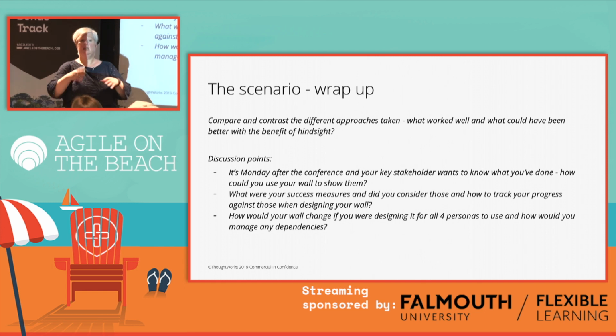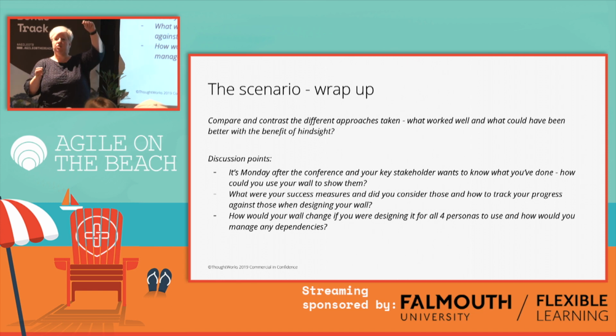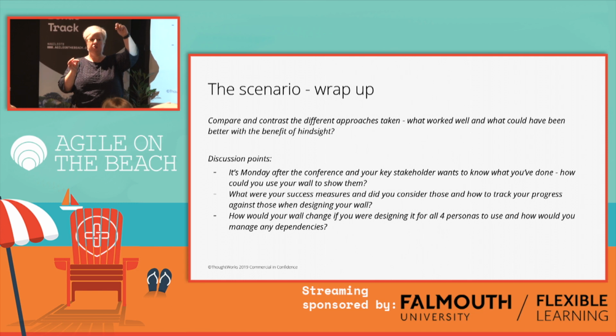I've used that as well. Sorry, the lady here was saying to just take a piece of string and put it between 2 different stories in different swim lanes, just to show, it's a very visual, lo-fi way of showing that there's an interdependency between those 2 activities that may cause a blocker. Sorry, this lady had something.